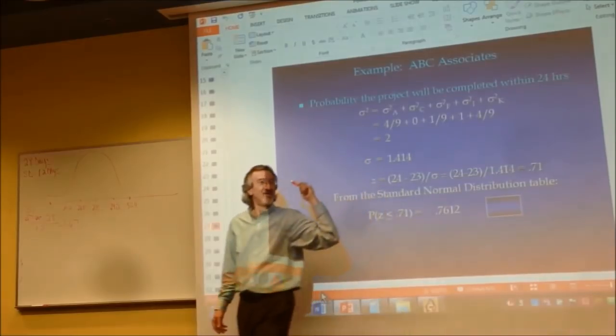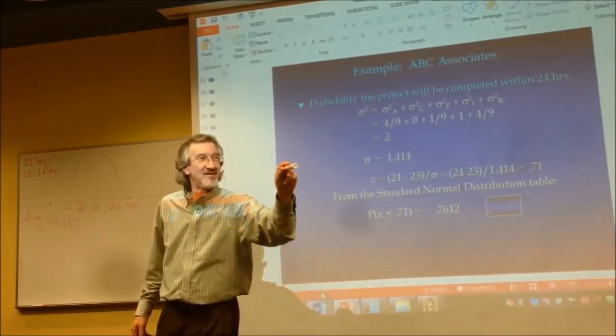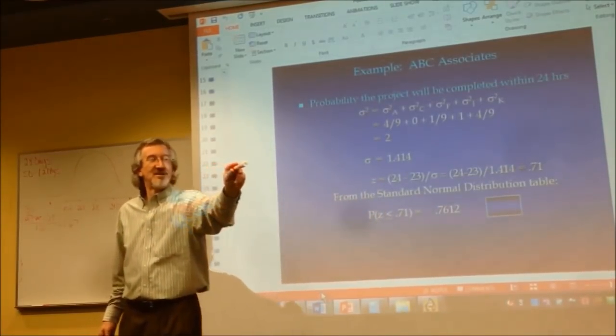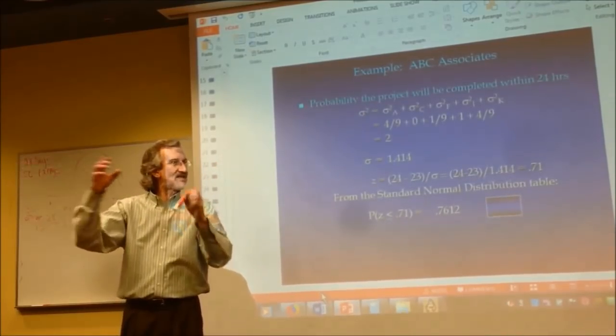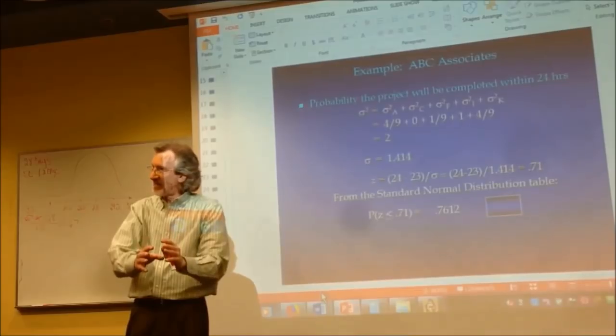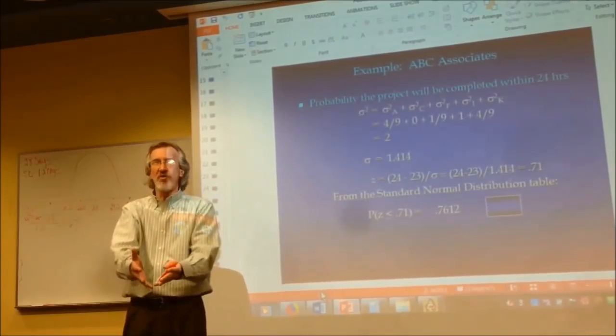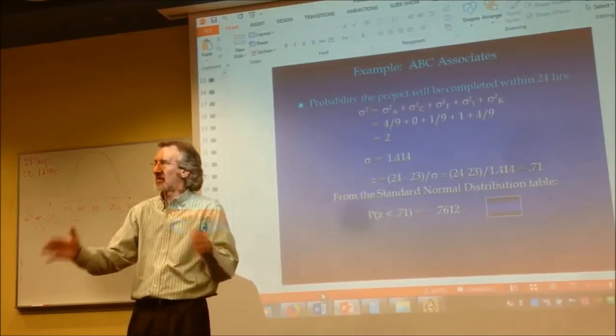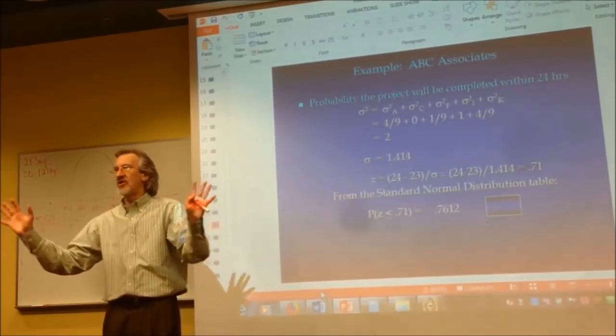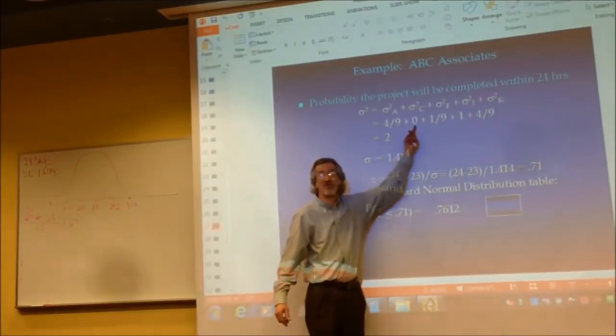Huh? I heard something. Optimistic time, pessimistic time, and most likely time. They're all the same. It's one activity that we were all able to agree exactly how much time that activity would take. There was no, you know, we know that one for sure. So the optimistic, the pessimistic, will all be the same number because this is one activity that everybody can agree on, which means it has no variance.